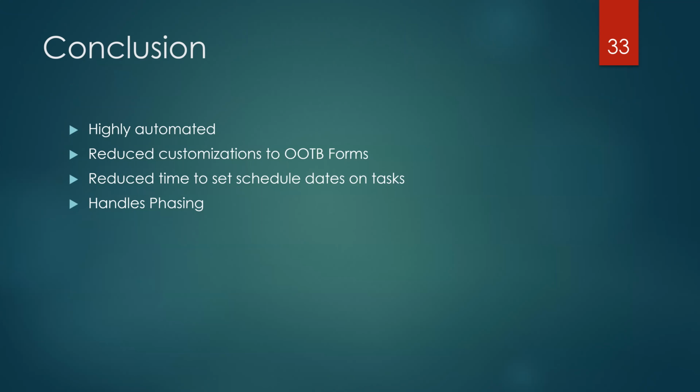It's not about the previous task you just did, because you could be in the middle of a whole group of sequence 5 tasks, and I've got to remember what my last date on my sequence 4 was in order to set every one of them manually. Not only that, if I'm strictly using out of the box and I don't have estimated days down there to look at, I've got to figure out how many days, which means I probably have a spreadsheet over here that I'm having to go look at to figure out what we decided all that was.